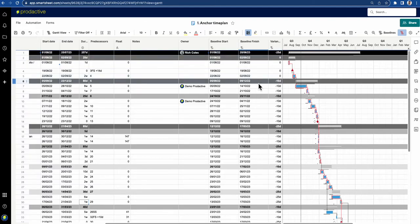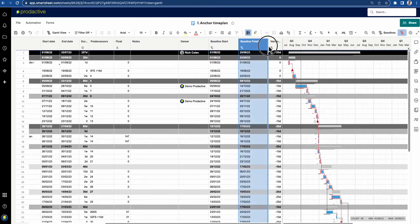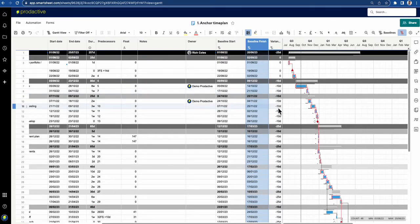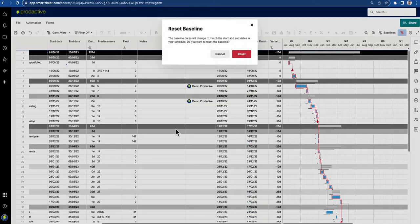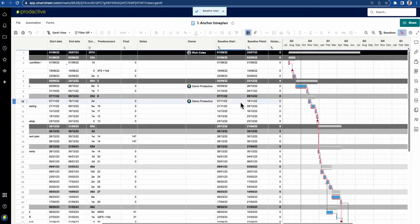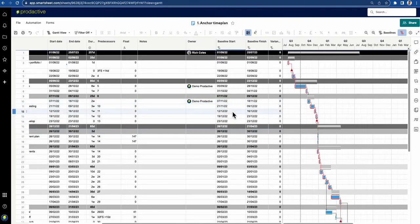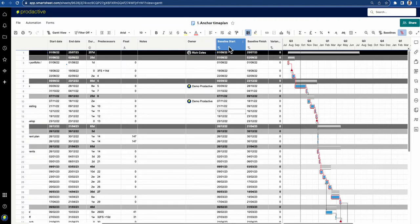Through the course of a project, the project might go red and after management meetings you agree an action plan with revised dates. You can then go into the baseline and either reset or remove it. In this case, we now accept we're behind schedule, we've replanned — so we're going to reset. The baseline dates change to match the start and end dates in your current schedule.